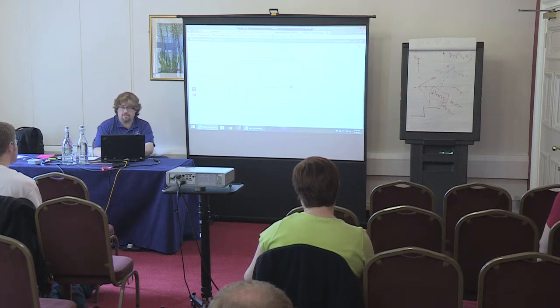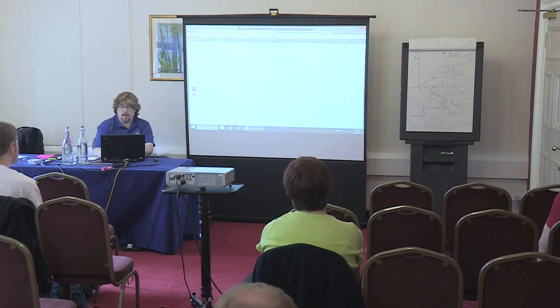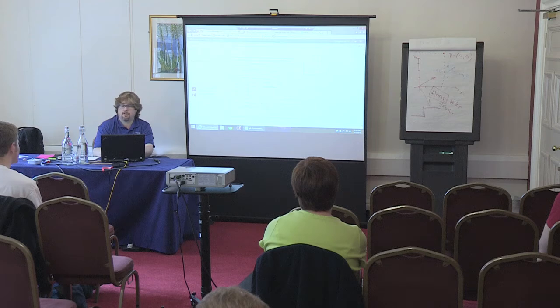And you pick a start date. Today would be a good day considering it's brand new. And we'll go 2 weeks out, and we'll say 16th. And then what they'll do is, if I do that, they go, oh, okay, well, our guess is you want to do 2 week sprints. And they'll go forward like that. Okay, come over here. We'll do one more.